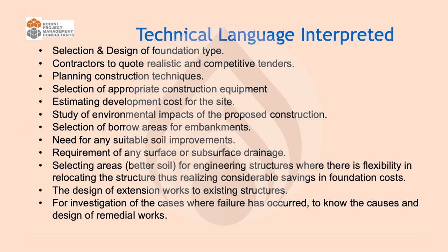So it will be very easy to understand how a foundation will rest, what load is coming onto the soil, and how it will be dispersed. Once you are ready with the calculations, the person who is going to execute, whom we call the contractor, can quote more realistically, and you can have competitive tenders. You can also plan construction techniques. Unless you know what is underneath, you will not be able to know how it will be executed, right?